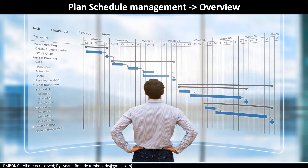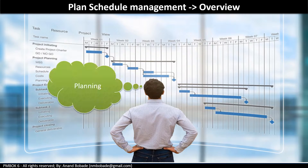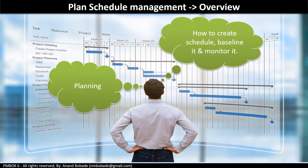Now think for a moment about the plan schedule management process. It is about schedule planning — note that we are not creating any schedule here. We are thinking: how to create a schedule, how to identify activities, how to sequence them, what template will be used, what tool will be used to create a schedule, who will help you to create the schedule, what are the roles and responsibilities, how the schedule will be baselined, and how the schedule will be monitored and tracked throughout the project life cycle. If you had created the schedule and baselined it by following these activities, you would not have faced the issues described earlier.